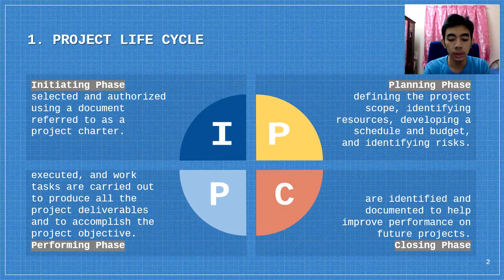The detailed plan results in a baseline such as scope, deliverables, activities, sequence, resources, responsibilities, duration, schedule, budget, and risks. Benchmark the baseline plan to allow for comparison with actual progress. Include the people that will actually do the work in the planning process. They have knowledge of detailed activities to be done. Participation also builds commitment.